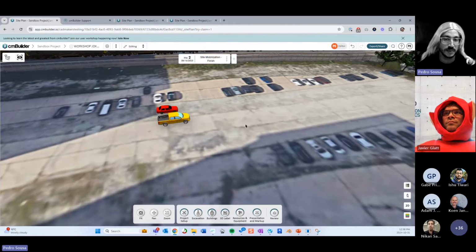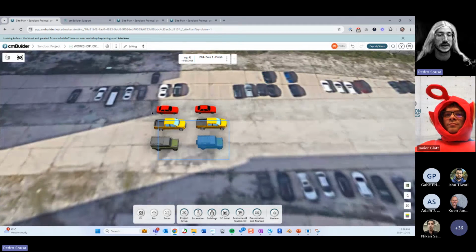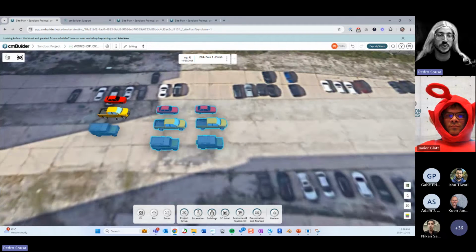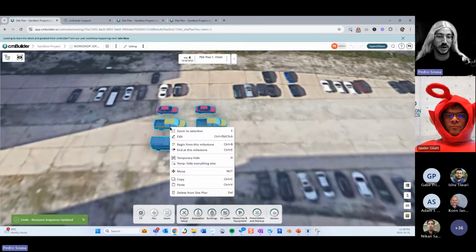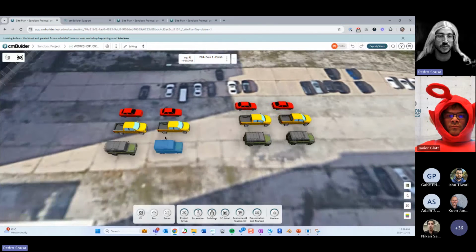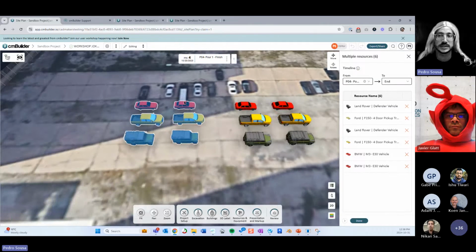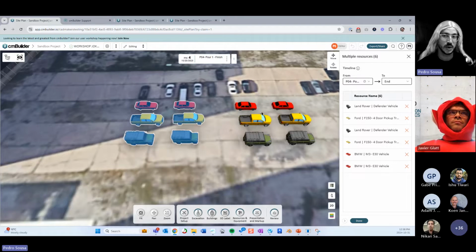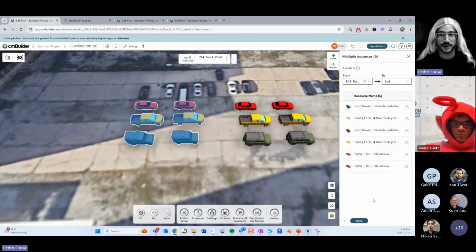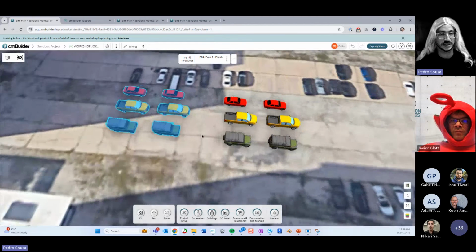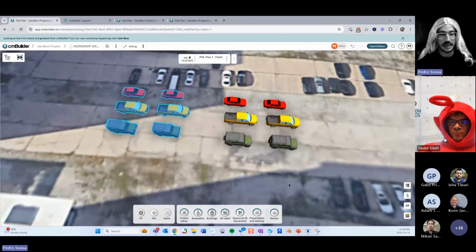But if I do a multiple copy paste, this will put all of these elements to start at the milestone that I'm active in. You won't carry the start and end dates for each one of them. They will be assigned to the milestone that you're active at the moment. Okay, so it's something to keep in mind whenever you're using this tool.